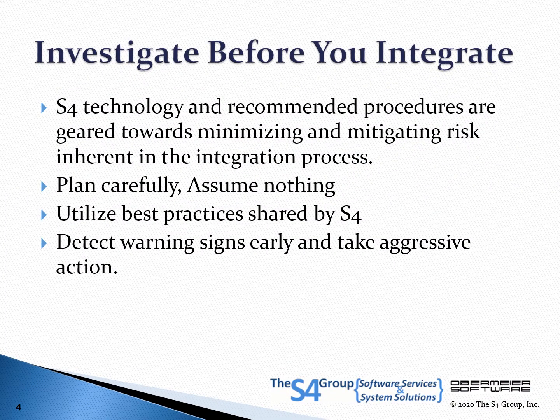The S4 Open Appliances go significantly beyond the functionality of a communications gateway by automating as much of the integration and commissioning process as is practical. Always remember that it is an integration process, and the first step should always be validating the integrity of the N2 bus and the operational status of all N2 devices.